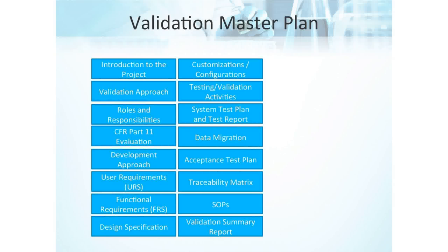Now we get into the traceability matrix. This is one of the more critical elements in your validation master plan. It's the traceability matrix that ties all the development specs to the validation and testing activities. It's painstaking, and it's a line-by-line matchup of every requirement to every test script. So this is typical when you're using paper, if you will, but you do it in Excel. So, absolutely. You would have your user requirements, and each user requirement needs to trace to a functional requirement. Yeah, so you have one row that says business requirement, test, and user acceptance testing.